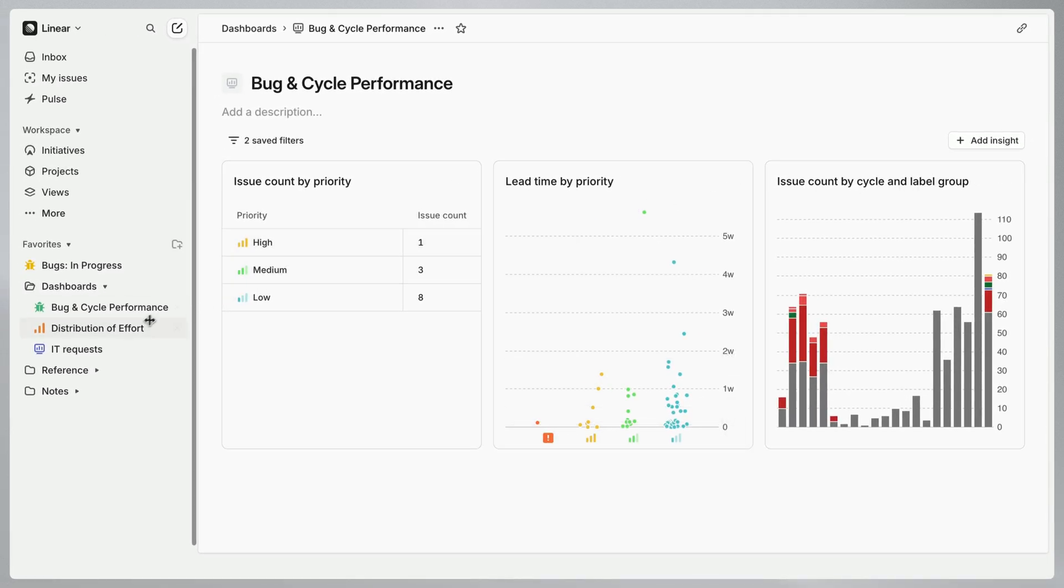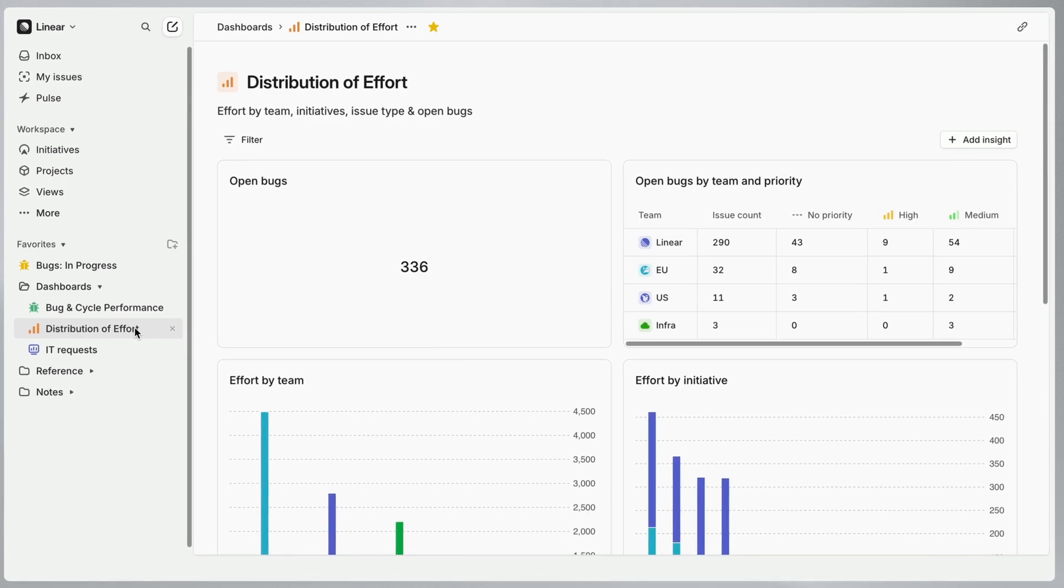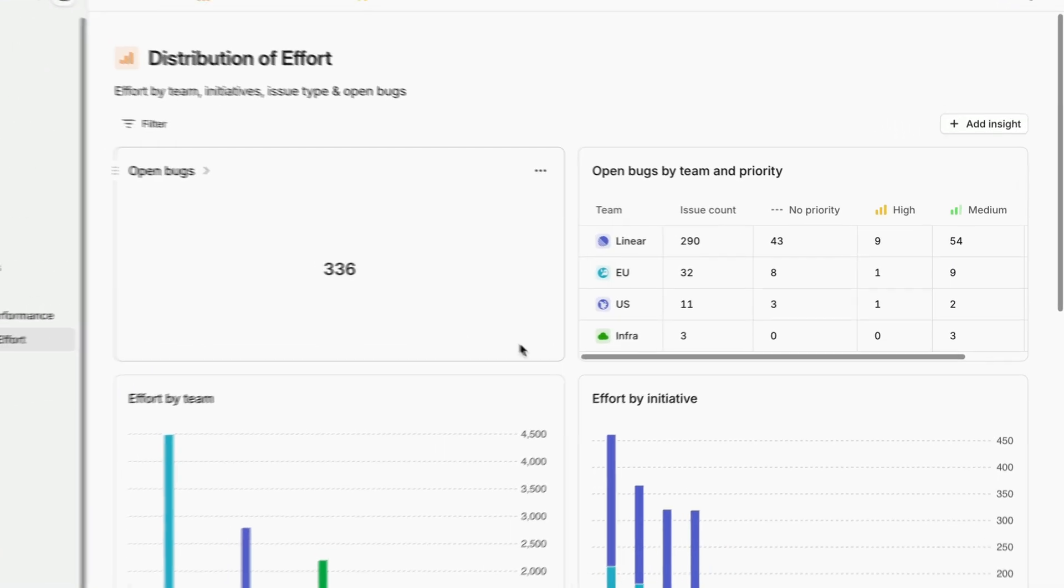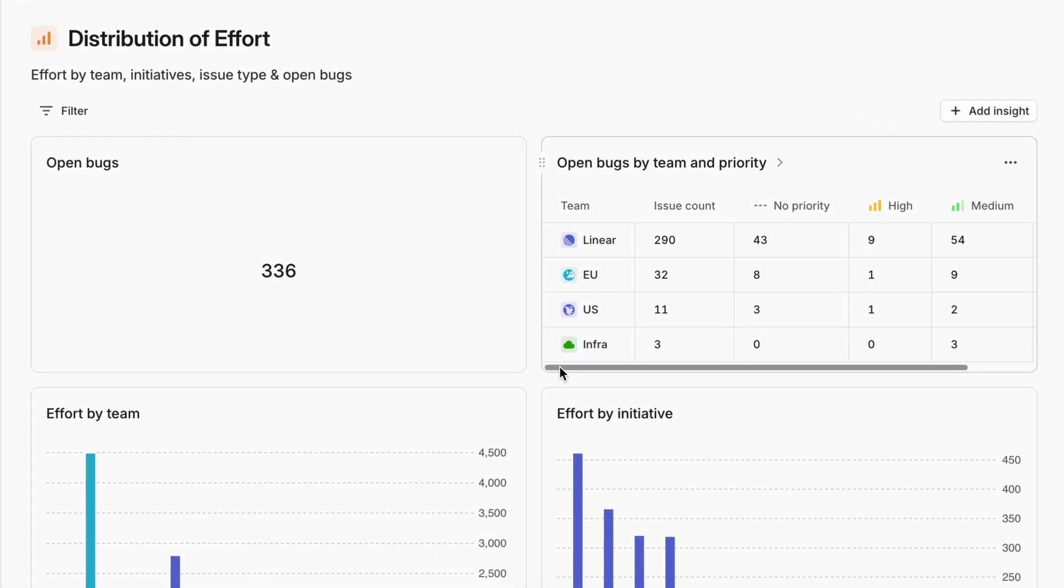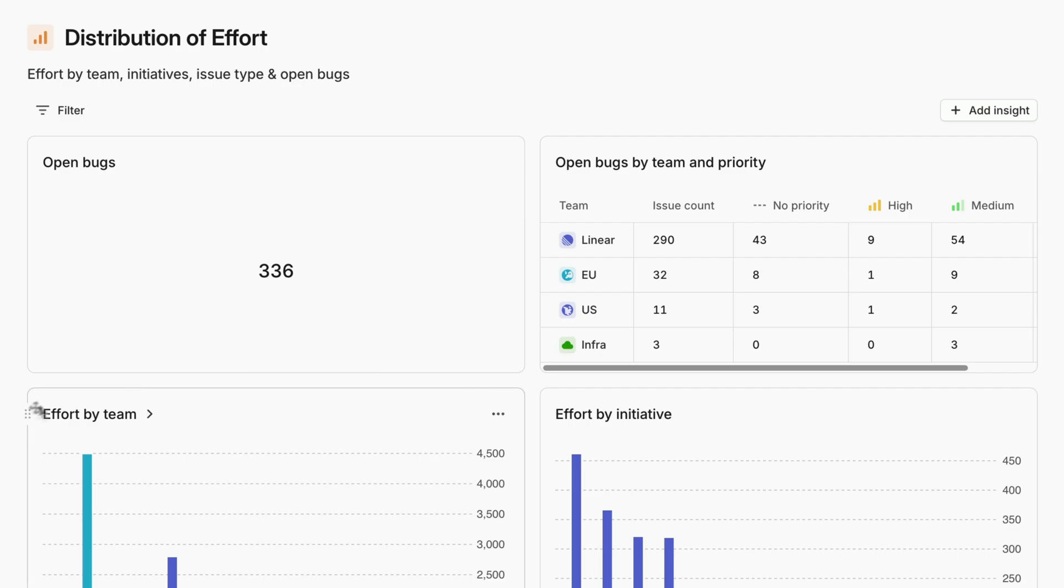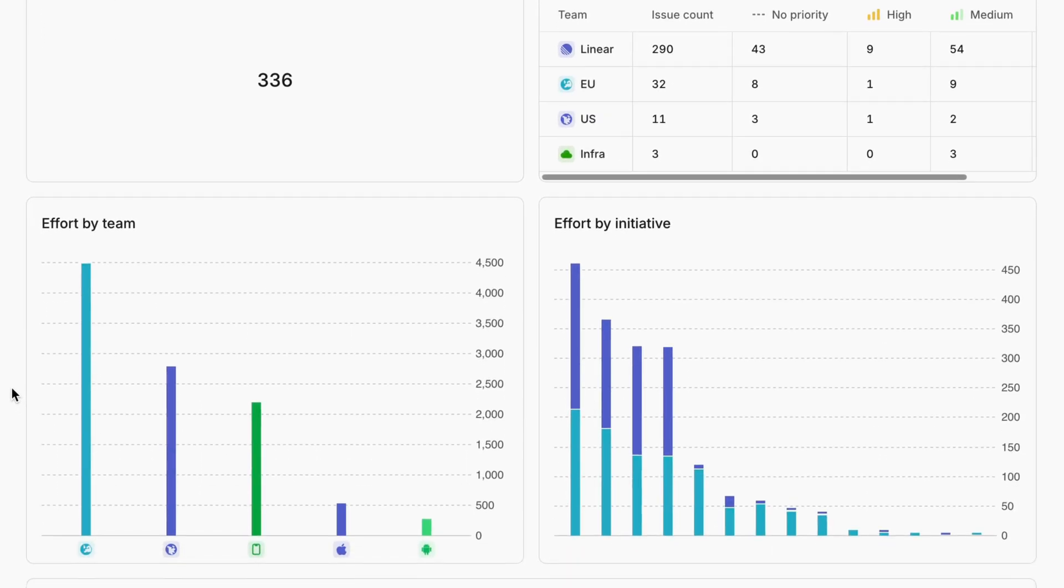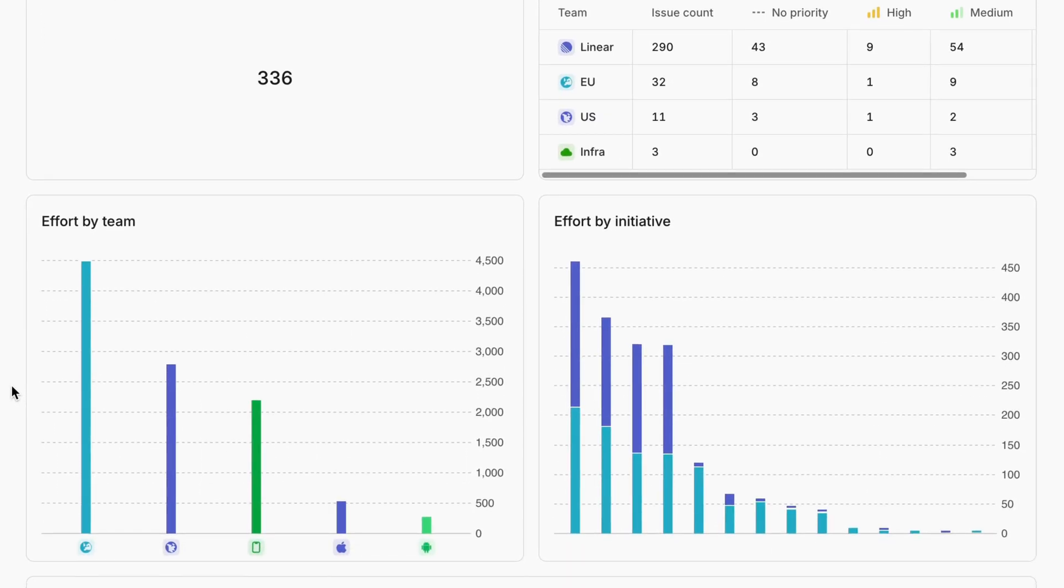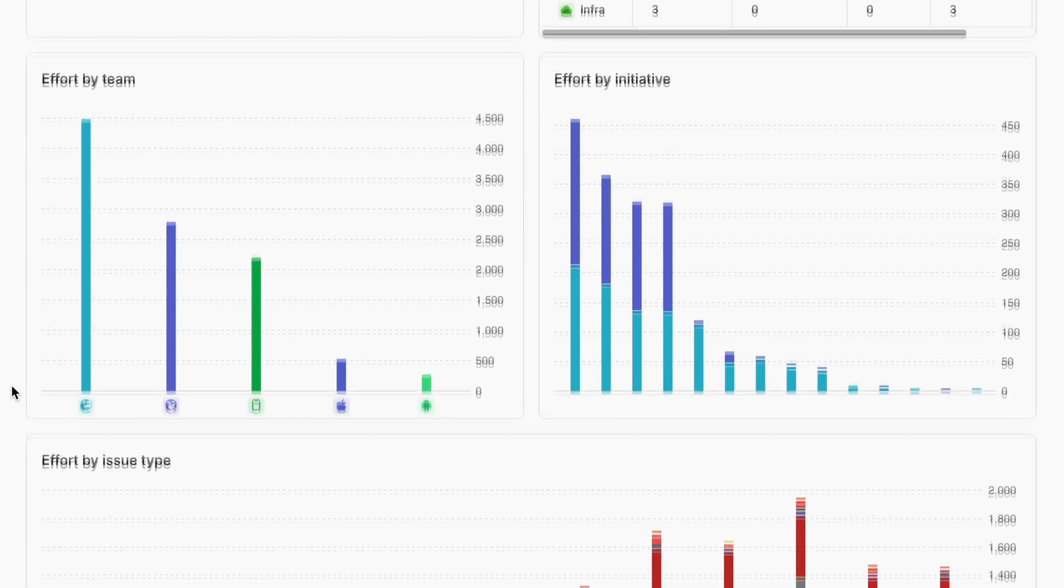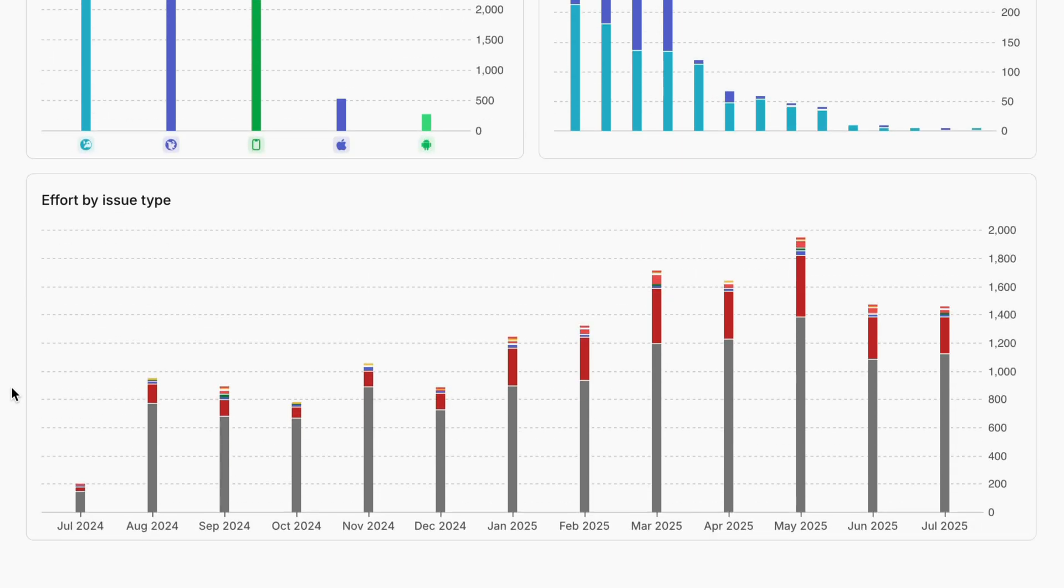This next dashboard monitors distribution of effort across teams. As a reminder, effort is calculated based on issue estimates. So in this dashboard we've included a view of open bugs by team and priority, effort by team, effort by initiative, and effort by issue type.